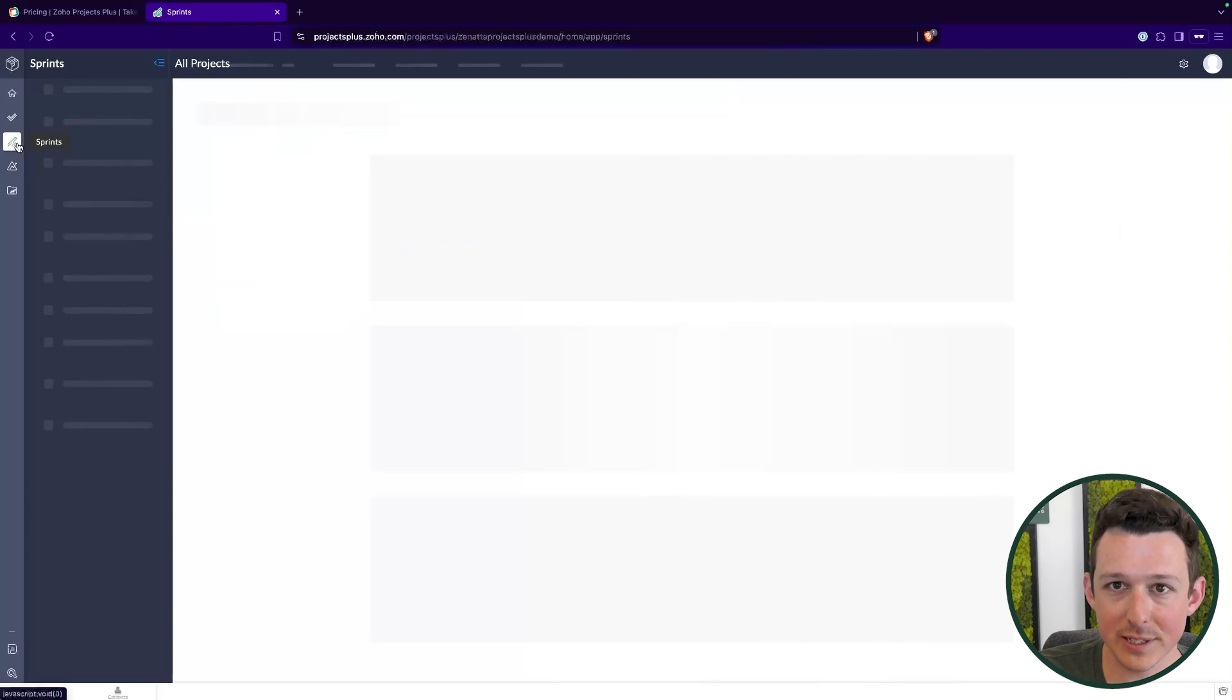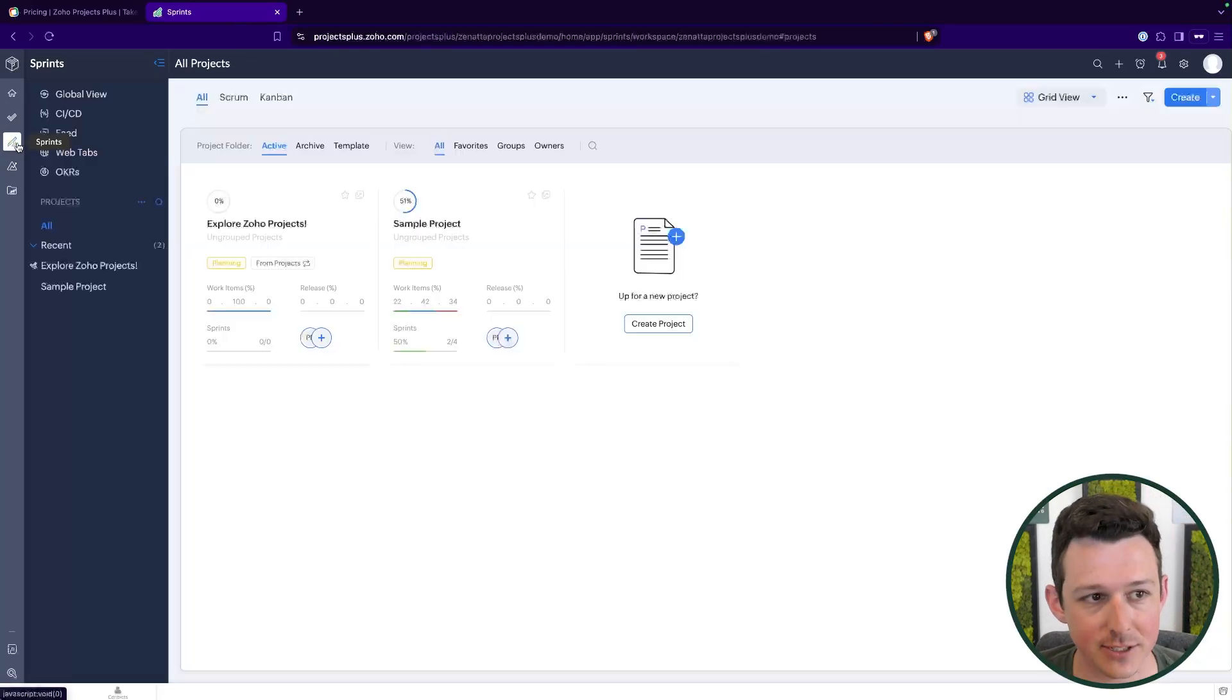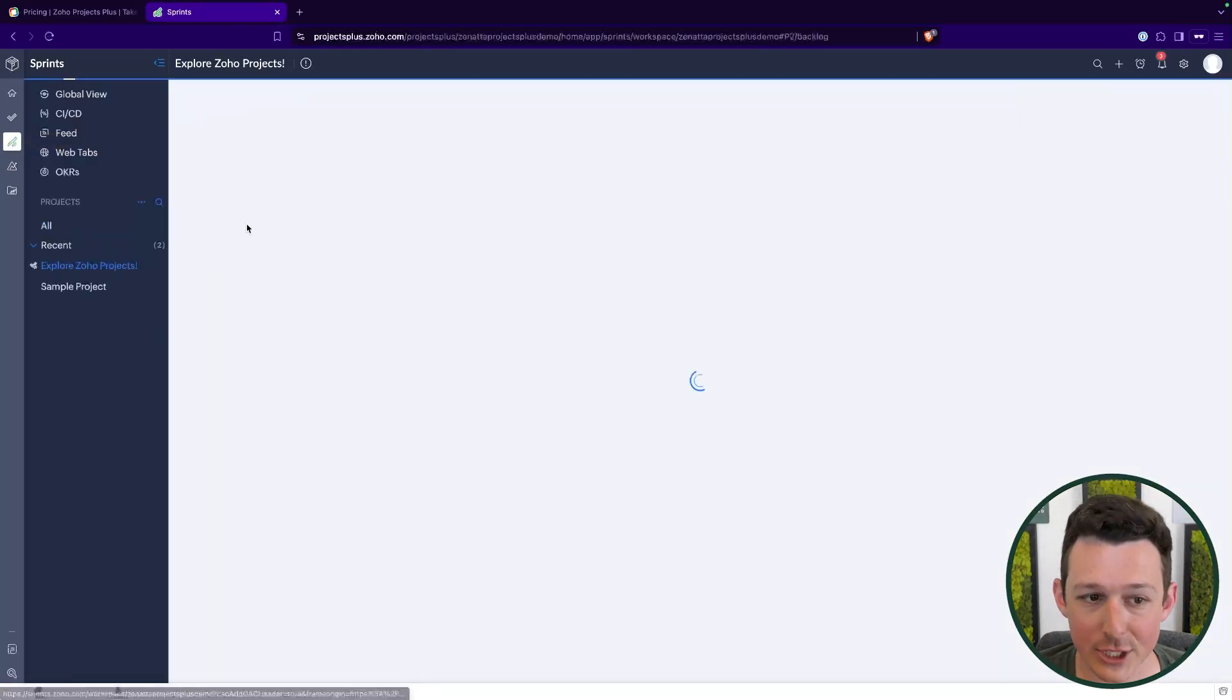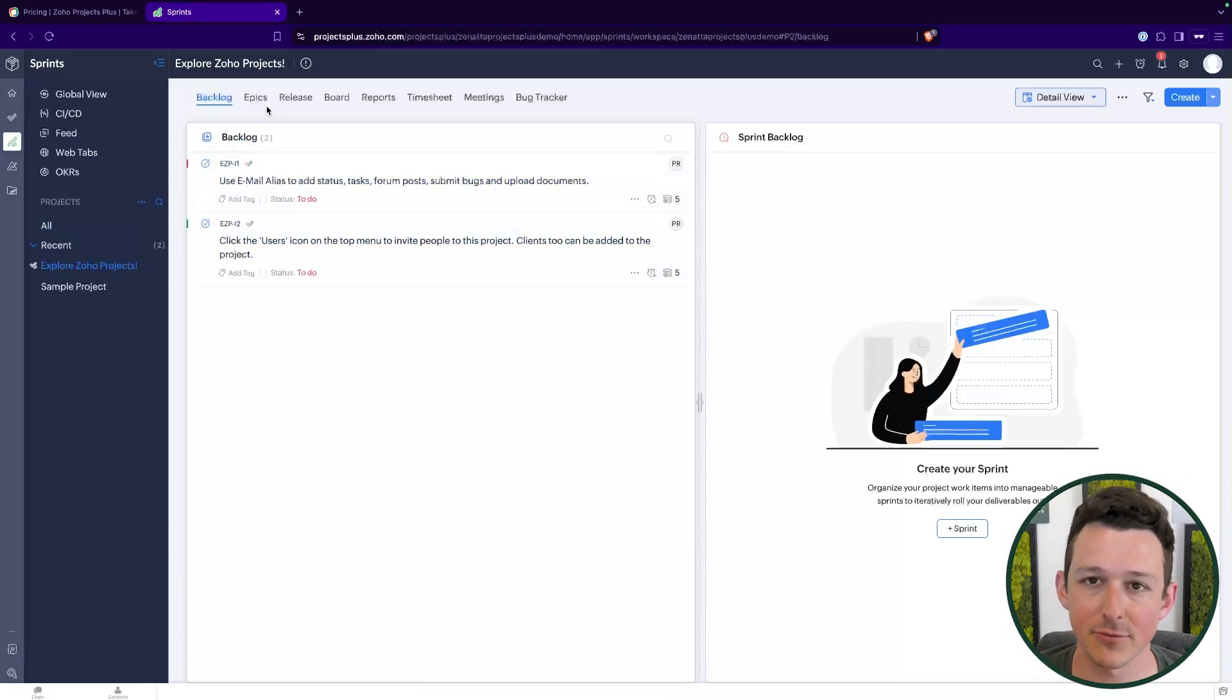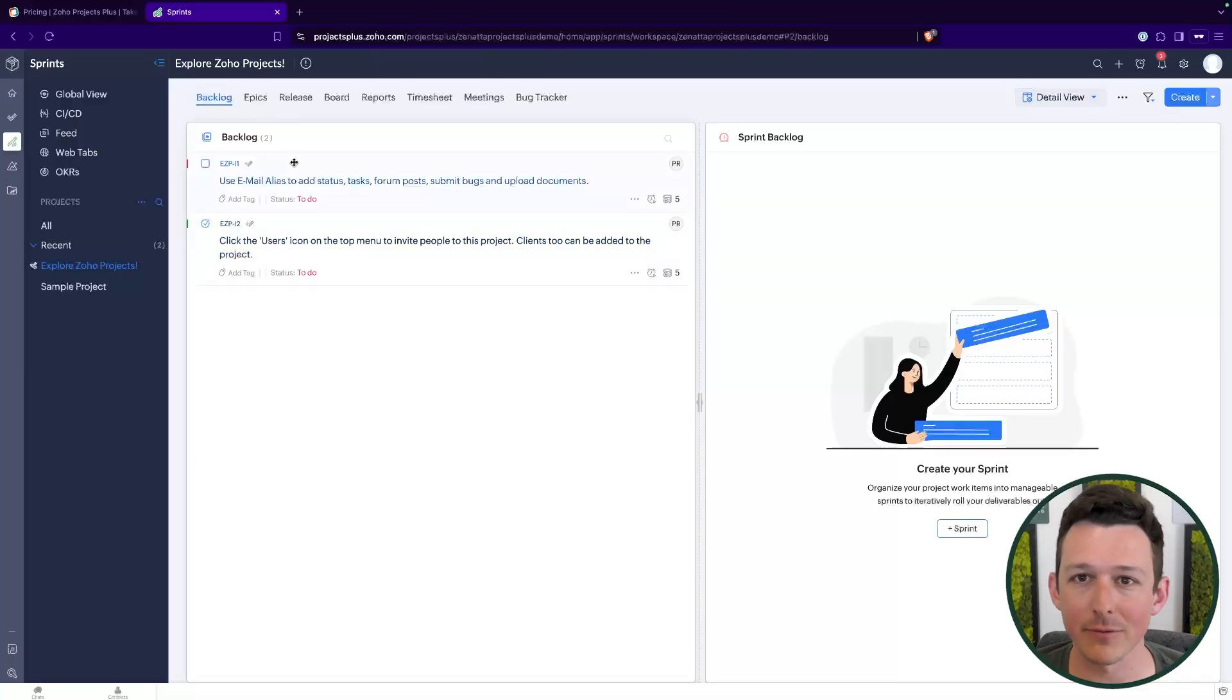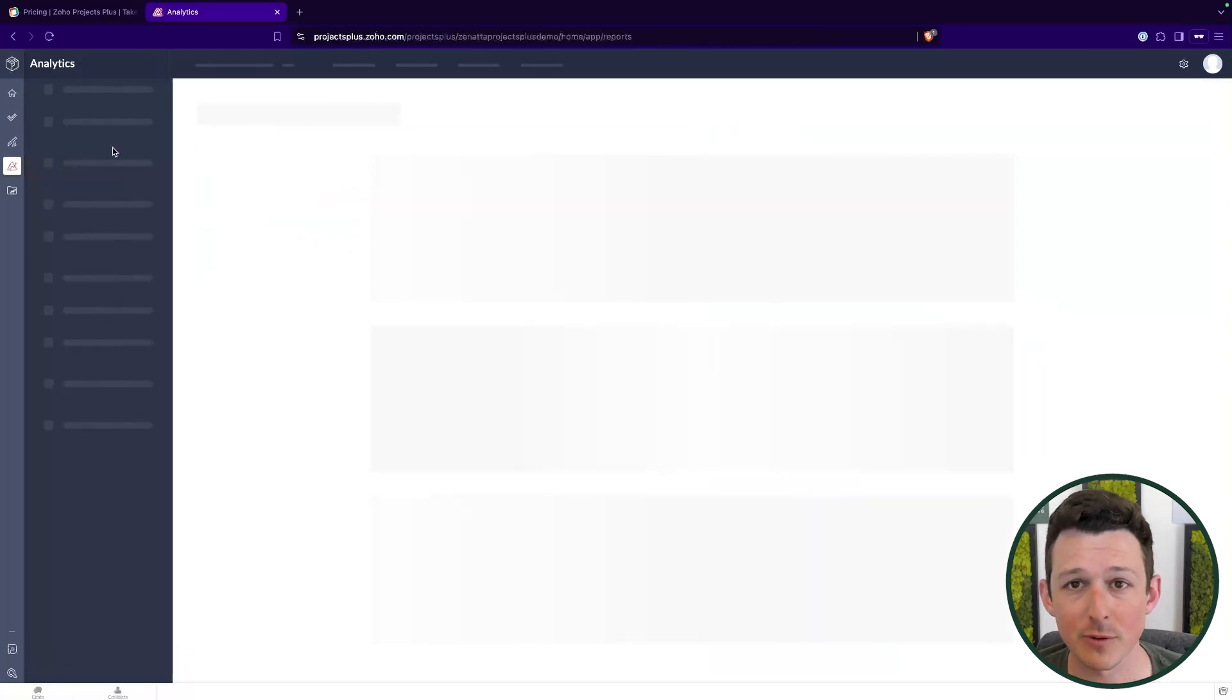Now over on the Sprint side of the aisle, those same tasks are going to appear grouped under that same project and I can work them using the sprint methodology if that's going to make more sense for me for managing those particular steps of the flow. So this could be like you have a large engagement with the client, one of the milestones is about software development and you're like 'hey I really want to manage that as a sprint, but some of these other things I just want to do the traditional Gantt chart.' You're able to accomplish that very easily here by just handing off those tasks into Zoho Sprints.